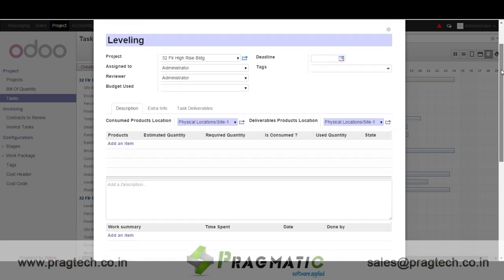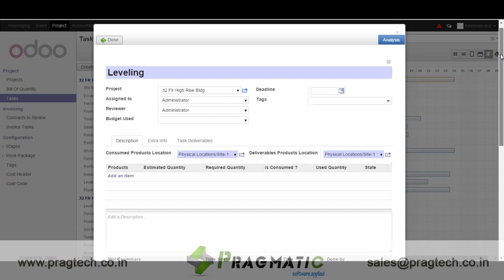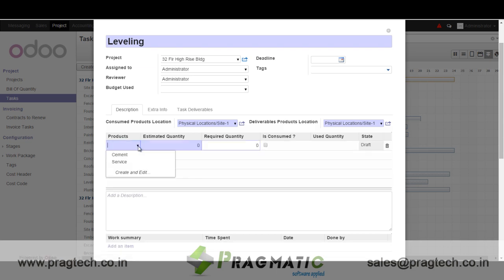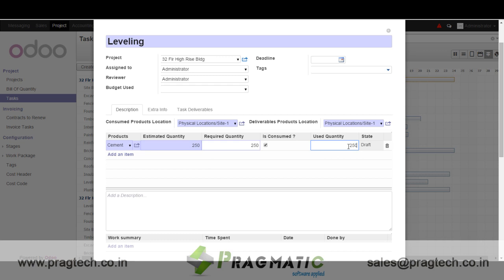To capture actuals, in the Pragmatic module we capture details of a task at the actual level. Selecting a task shows estimated items populated with estimated quantities. I can enter that 200 units were consumed, keeping 50 as a backlog for a later update. This indirectly manages your budgeting — you cannot request an item not linked to this particular task. The system tracks budget in two ways: budget on quantities and budget on total price.